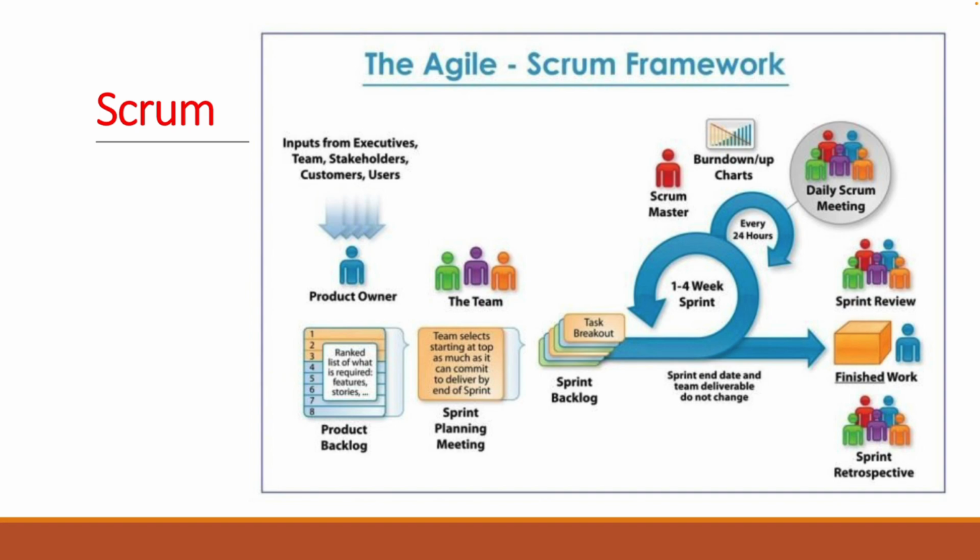But in general, the product owner is a part of this sprint review meeting, and they set the stage as to what we should be working on, what we should be thinking about for our next sprint planning, and so on and so forth. And then the work is done, it's finished, it's either released or deployed to some environment or some other thing if it's not going to production, and you've basically finished your sprint, right? And then at the end of that, you need to do a retrospective, which means I need to reflect on what we did. The whole team comes together, the whole team, not just a few people, the whole team.